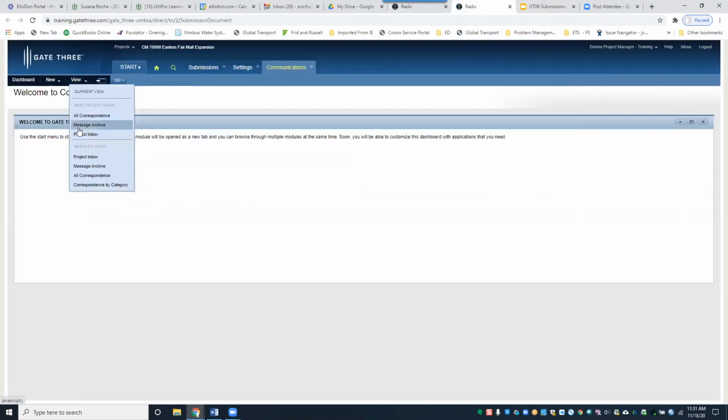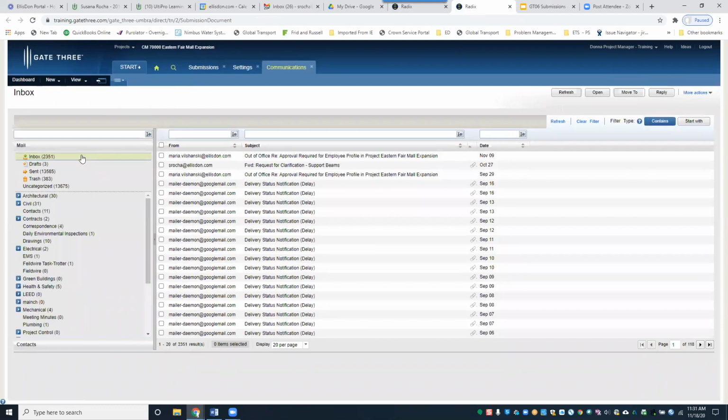Sorry, I just have a quick question. Sure. So for the transmittal, like if you have the 4-stage review, it's only done once this Ellis-John review is complete. Is that correct, or can it be done at any time? No, you should really only do it when you're packaging, you're uploading and sending the Ellis-John stamped PDF and the package you want to send to the primary consultant.